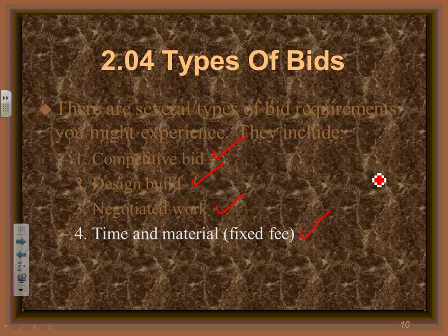So they will tell you our rate to come and fix your house is $150 to send a crew, a truck to fix the problem. So they start counting hours and multiply by 150, plus the material that they use for this job. Do you think you can build a stadium like this on time and material?